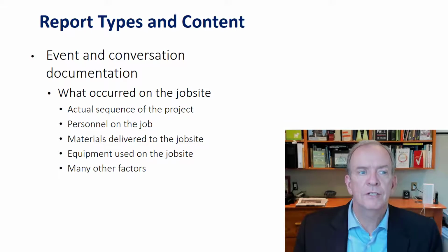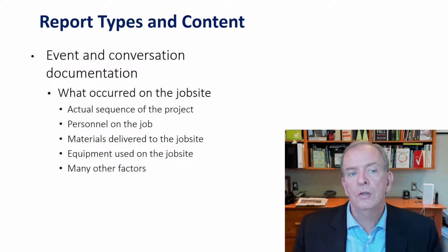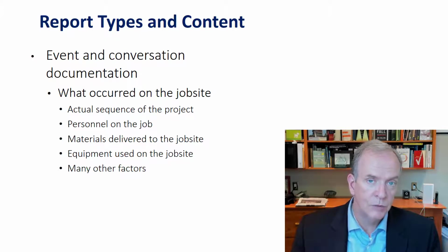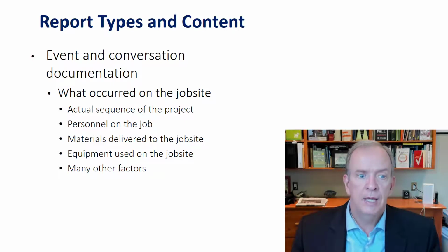So, event and conversation documentation: what occurred on the job site, the actual sequence of the project, the personnel, materials delivered to the job site, the equipment used. If we're tracking that, that can be very, very helpful. It can be helpful for data for future projects so that we have an idea what sequencing works best, what requirements we need. It can be helpful to match up against a bill.